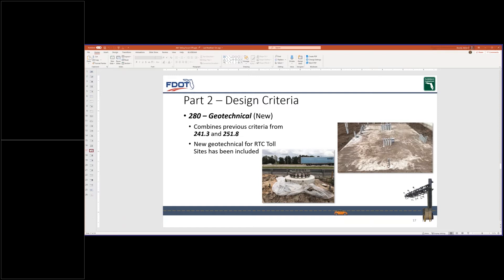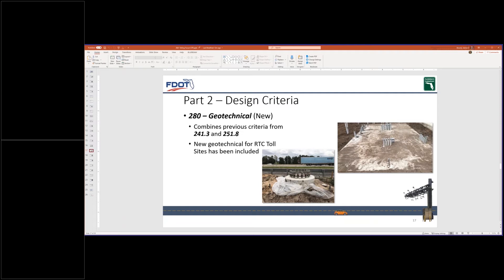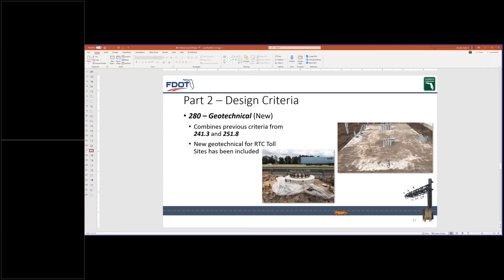At this time, does anyone have any questions for part two? James, quick question. Is the RTC application only going to be considered for ramps or both mainline and ramp scenarios? That's an excellent question. And right now, it's being considered on a pilot project for ramps. Our intent is to use them on ramps because of the restrictions that the cabinet has for the vendors. It can only handle up to three lanes and two shoulders in a single movement per cabinet. And so until we have a good handle on the reliability and maintenance aspects of these cabinets, we're going to vet them through the pilot project to make sure we've worked out all the bugs before we move them to a higher volume mainline approach. Thank you. You're welcome.